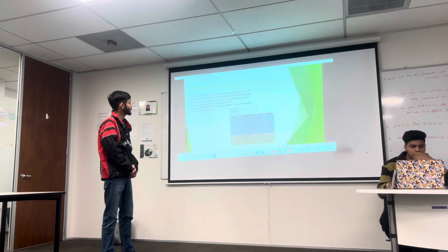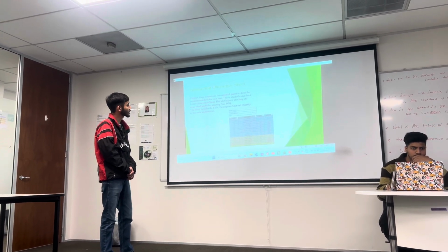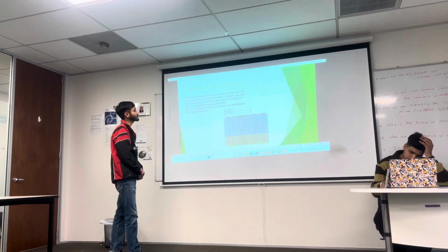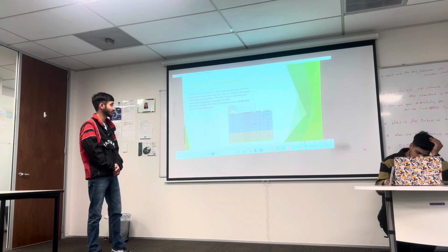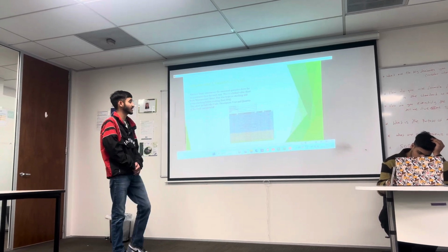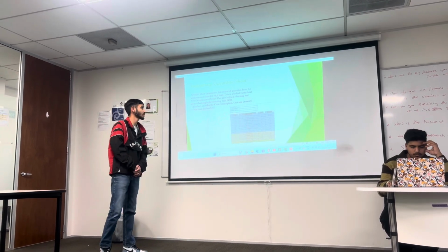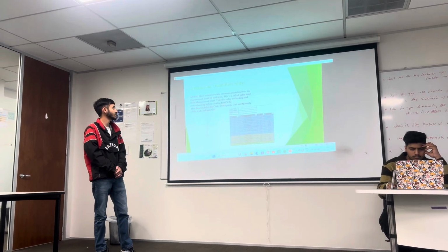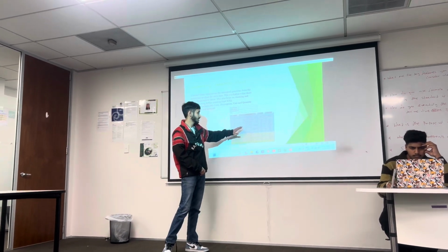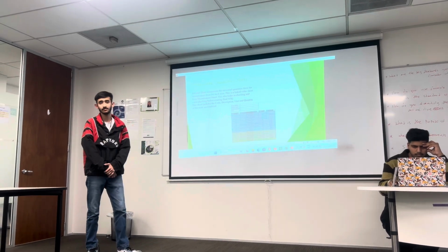And here we have the abstracting sheet. The abstract sheet summarizes the measured quantities from the measurement sheet for each item. This is a linked value sheet from the measurement sheet. This also helps in checking and cross-checking before creating the final schedule of quantities. This sheet includes the code, description, unit, and quantity of the trade and material. All the details which we have summarized are from the earlier measurement sheet.